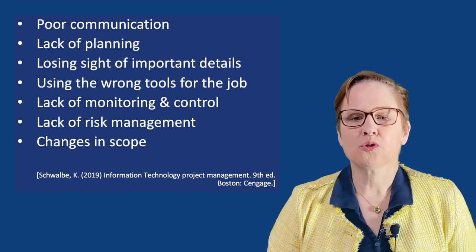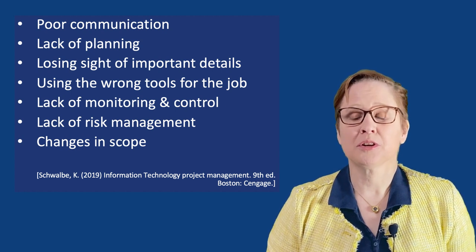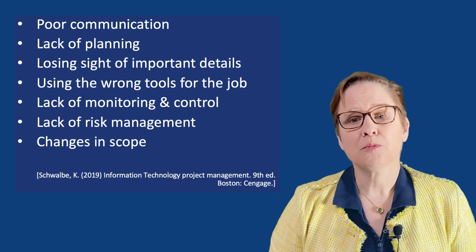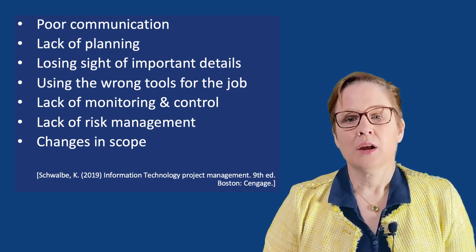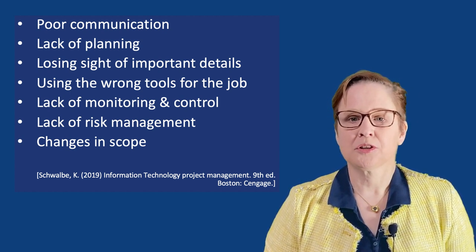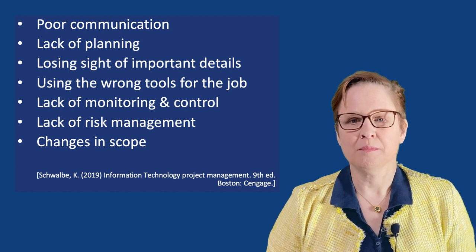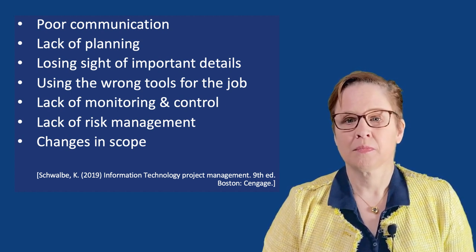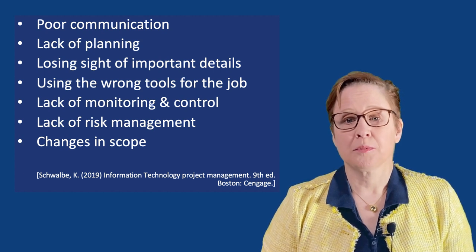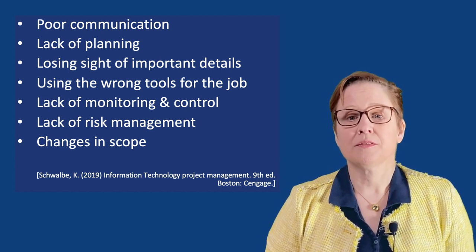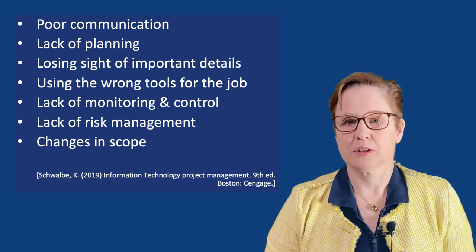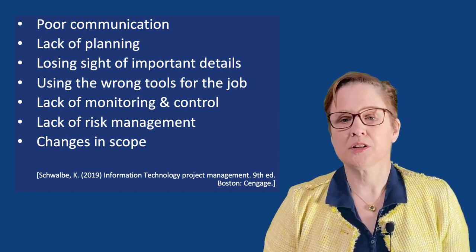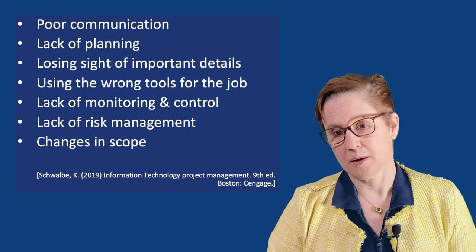Using the wrong tools for the job, such as everyone using a different CAD system to build the same aircraft. Lack of monitoring and control — checking during the project that you are still on track to deliver on time and that your project still meets the requirements. Lack of risk management: have you identified what could go wrong and anticipated for this. And changes in scope, when during a project a small change is required that ends up affecting the entire project.